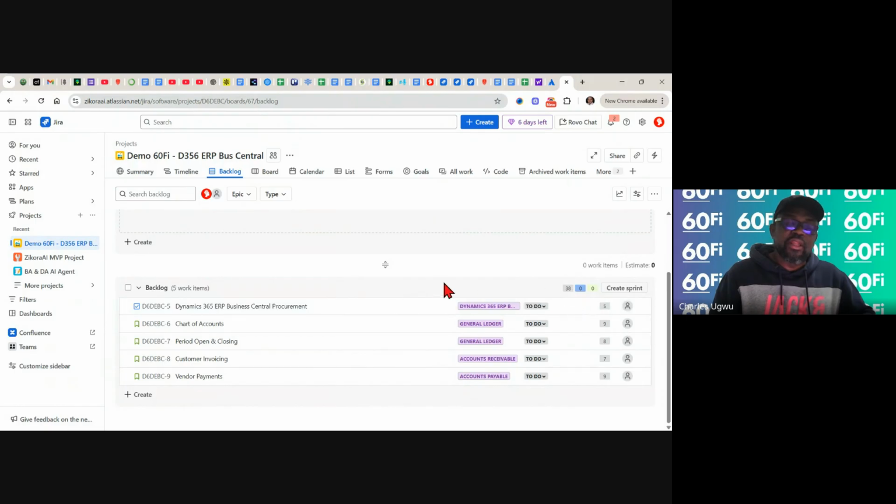So if in another project, like a third or fifth project, their capacity has been 38, and some developers want to make it up to 60, you, the Scrum Master, will say no. Why are you saying no? You already know their capacity. There is no need of biting more than they can chew. It helps you understand capacity.